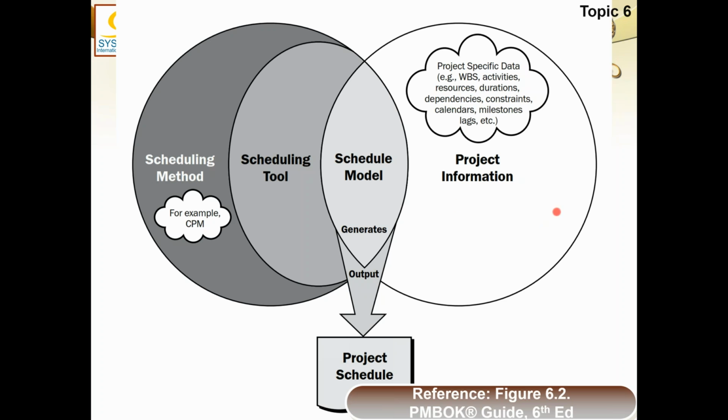So we will keep trying various options and keep creating more and more versions, more and more possibilities of the schedule model, as much as we can think of. This will also take care of scheduling risk and other possibilities. We will have maybe hundreds or thousands of schedule instances, which all have to be properly tagged, recorded, and archived. For that we need to have the configuration management system invoked. Proper versioning control should be done, and this process goes on.